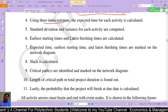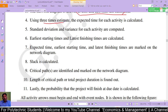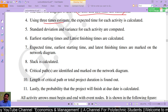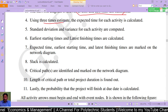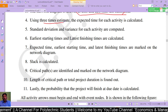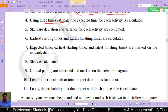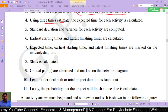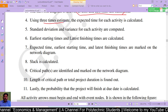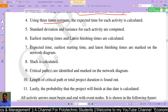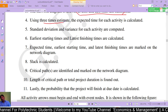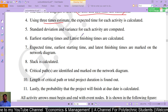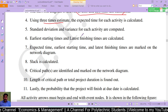The three estimates are: first, the most pessimistic — when everything goes wrong; second, the most optimistic — when everything goes right; and third, the most likely — the normal expected case. From these three estimates we calculate the expected time. Standard deviation and variance for each activity are also computed.